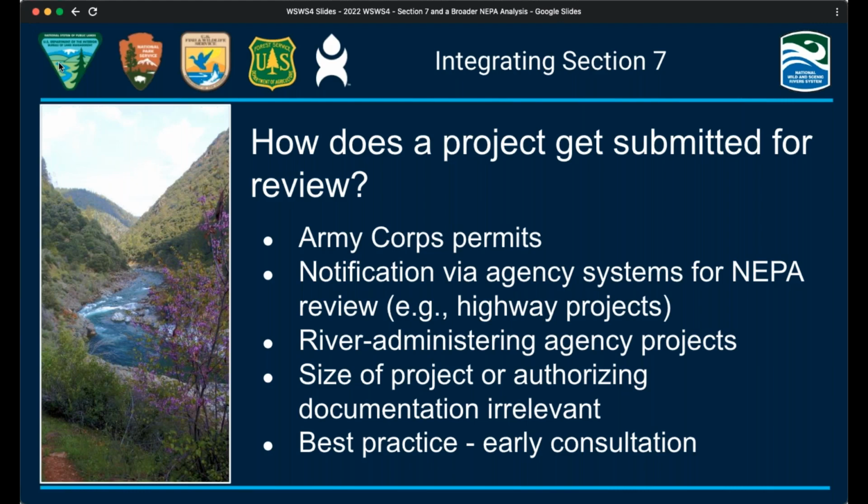For example, on the upper Deschutes Wild and Scenic River in Oregon, the Forest Service has a stewardship team comprised of representatives from state scenic waterways, the Department of State Lands, Deschutes County, and the Army Corps of Engineers to work with landowners on proposals for stream bank stabilization in advance of applications for permits from the Army Corps of Engineers, the state, or the county.